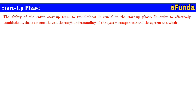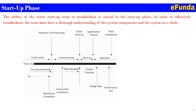During the startup phase, the ability of the entire startup team to troubleshoot is crucial. To effectively troubleshoot, the team must have a thorough understanding of the system components and the system as a whole. One can refer to the timeline diagram showing: construction, commissioning, startup, and operation. Starting with pre-commissioning — mechanical completion, construction completion, design rate, and perform testing — then ready for commissioning, followed by initial startup, after which specification product is achieved, and finally plant acceptance in the operation stage.